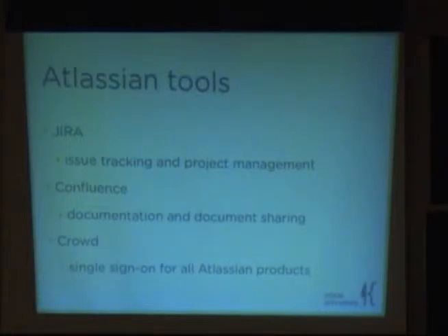They prioritize everything. We create a new project in Jira, and that is, well, a new release in Jira, and that is the sprint. So we file things into sprint 1, sprint 2, sprint 3. It can be modified to have certain states that are more granular than in progress, or closed, or resolved. You can have things like needs info from client, needs screenshot, needs duplication, like we need to be able to duplicate this problem. So that's our issue tracking and project management.